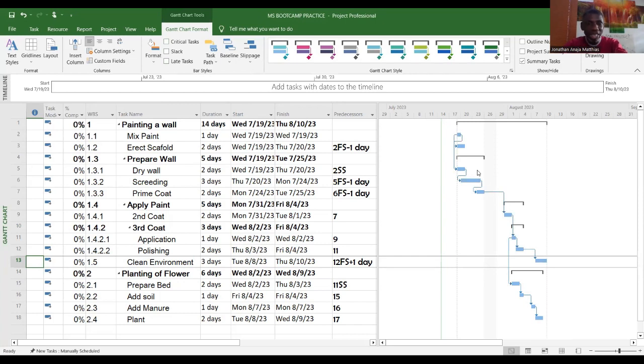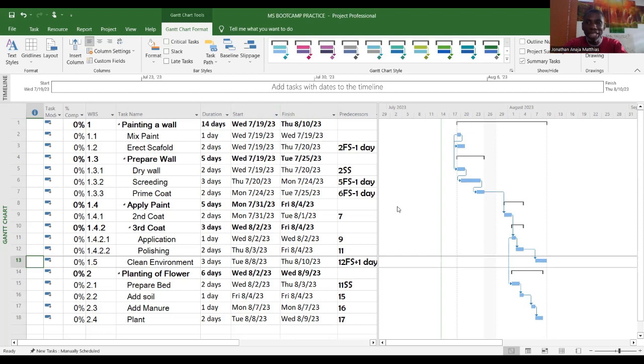So for this project, I can even take a list of it, give it to my supervisors and tell them not to play with this. If I am not on site or on the project area and somebody calls me to give me a certain report, the first thing I will ask the person is, is this activity on our critical path? Before that, I would have made it known to everybody the tasks that we should never play with.